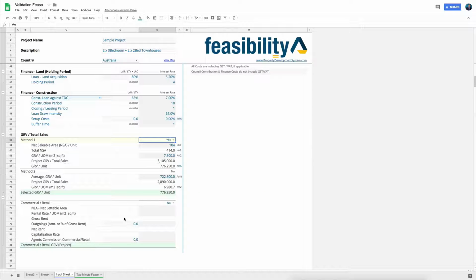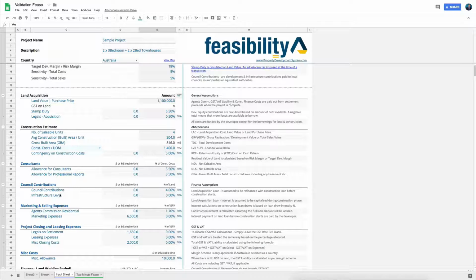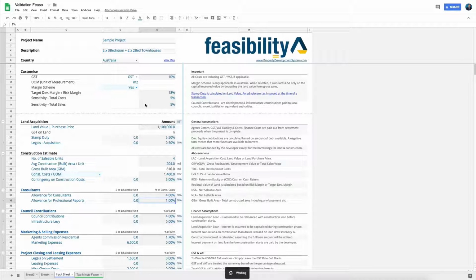But you can come back here and say, look, I've already got a permit in hand, so I don't need to allow, you know, extra 3% or something, or maybe I just need to allow 5% here, or maybe I'll allow 1% here or 4% there. See what that looks like. So you have to massage your feasibility and come as close to the correct numbers for that time as possible before you actually make a decision.